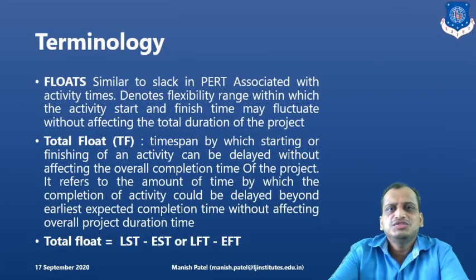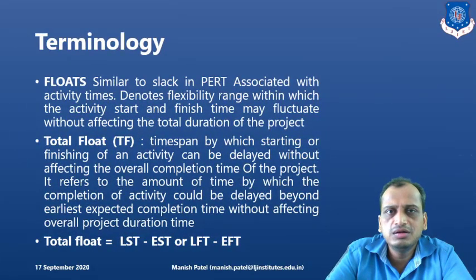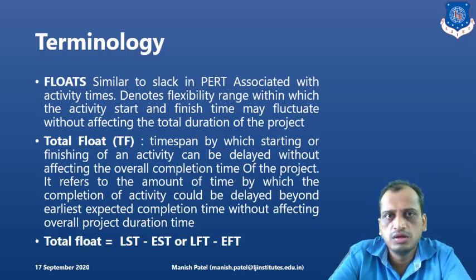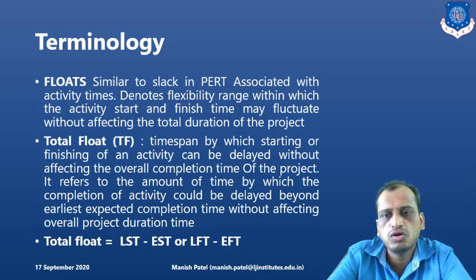So what are the terminologies which are related to the critical path method? The first one is the float. What is float? Float is the amount of time by which an activity can be delayed without affecting the project duration. Right? There are different types of floats involved. Let's say, for example, the first one is the total float, which is again the amount of time the activity can be delayed without affecting the overall completion time of the project. Clear? What is total float? It is LFT minus EFT. What is LFT? Latest finish time. You have the difference of latest finish time and earliest finish time.